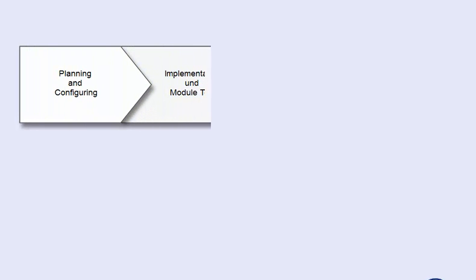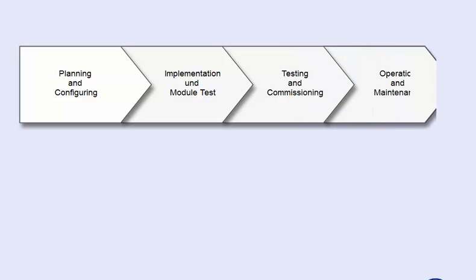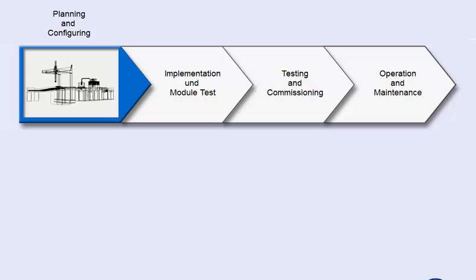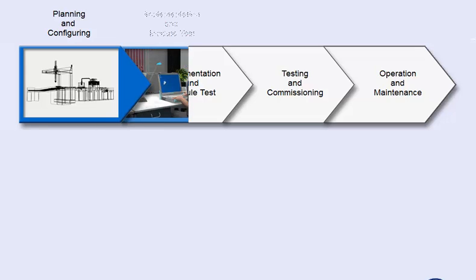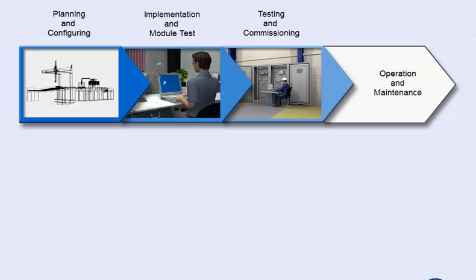An engineering project from the generation to the operation of a plant or machine is generally composed of the following four main phases: planning and configuring, implementation and module test, testing and commissioning, and operation and maintenance.